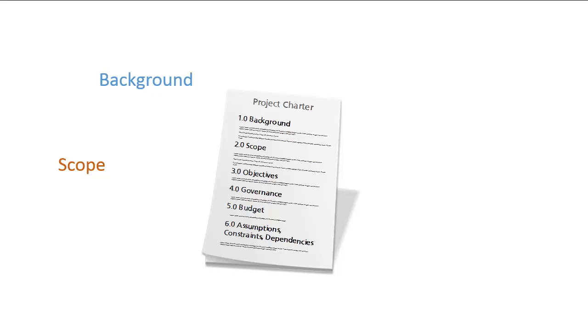So if, for example, your project team will design, build, and test the product, but the sale of that product and reaching certain revenue targets is not going to be the responsibility of the project team, then you should say so in the scope section of the charter.